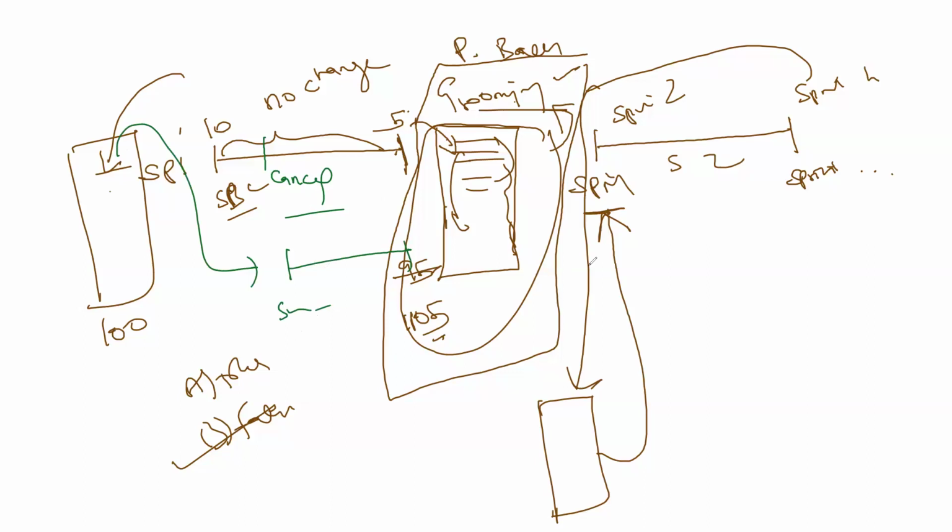So point for the exam, no changes allowed during a sprint. If you want to change something, you have to cancel that sprint and start a new sprint. Product owner is responsible for the changes in a product backlog or to cancel a sprint.